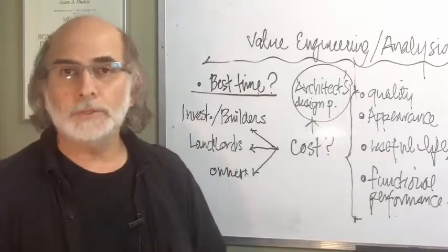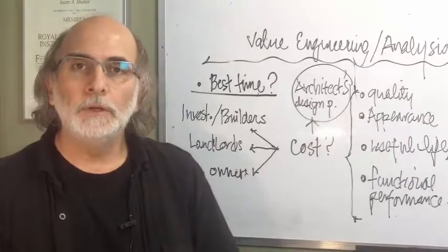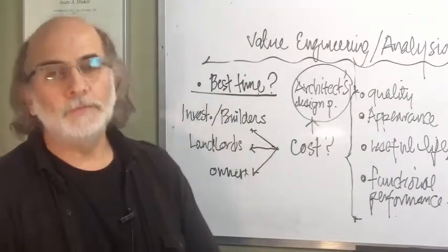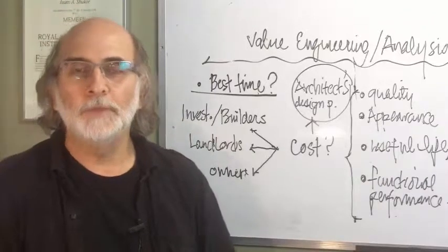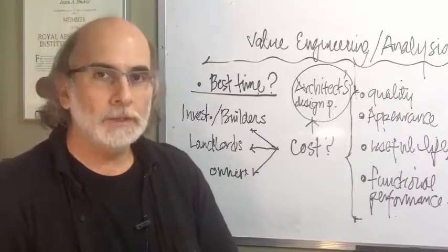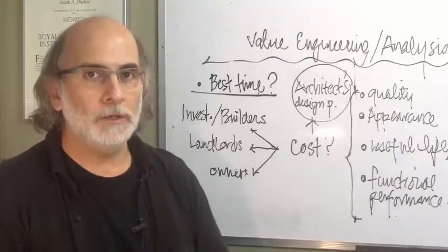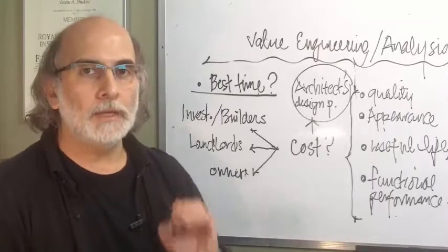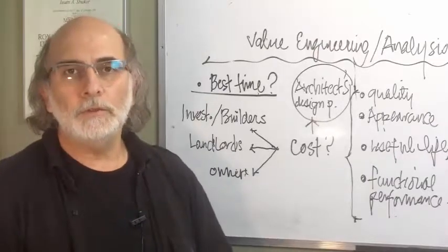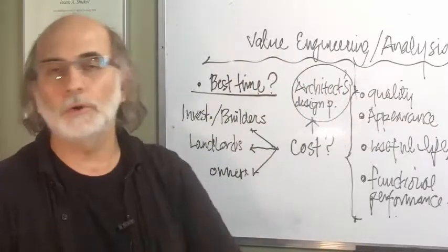Now, in order to answer these questions, I would say yes, you do need a value engineering. The second answer is no, you don't. Now, how do I resolve this conflict? It is easy. If your architect does not do a value checking or a cost analysis or value engineering, in other words, then you need a third party to do the value engineering for his or her design.